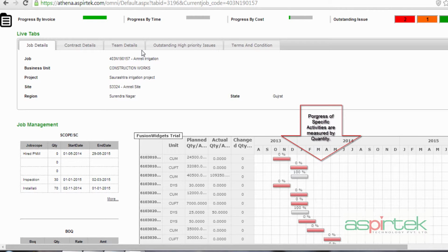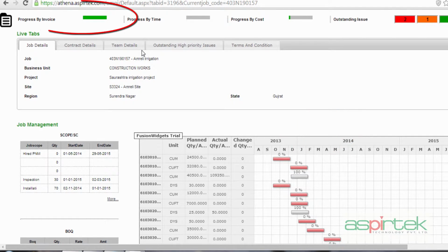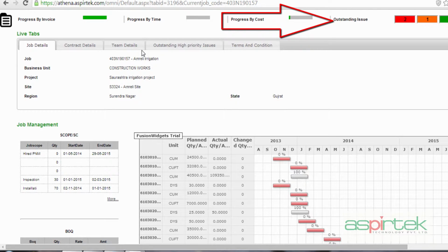So in this particular project, we can see that the invoice progress is actually more than what has been expended. So in this particular case, we are actually in good shape in that we have invoiced the customer more than what we have spent. So from a project management perspective, taking a look at these 4 KPIs gives me an overall idea of how the project is performing with respect to timeliness, with respect to cash flow, as well as with respect to actual amount deliverable.